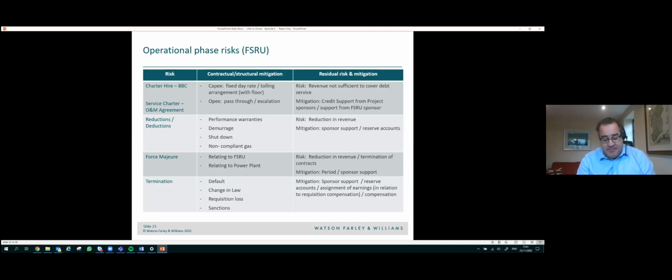In addition to a reduction of hire, we have seen some developers impose a regime where the FSRU sponsor is liable for a proportion of the actual damages that the project suffers as a result of the FSRU's deficient performance. But the possibility of the FSRU sponsor being responsible for direct damages incurred by the project, even if there is a general cap on liability, will, needless to say, be of significant concern to the FSRU sponsor and its lenders alike.